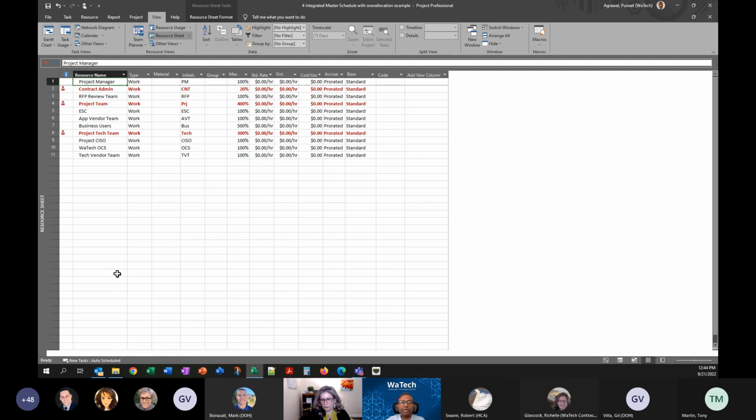We know in IT projects we have done in the live project, people move on from one role to another within the project, within the agency, or even across the agencies, and they go to different organizations. And if you have specific names, you might have a little more rework than otherwise to make all those reference changes. For the past, you keep it. For the future tasks, you change it, and things like that.